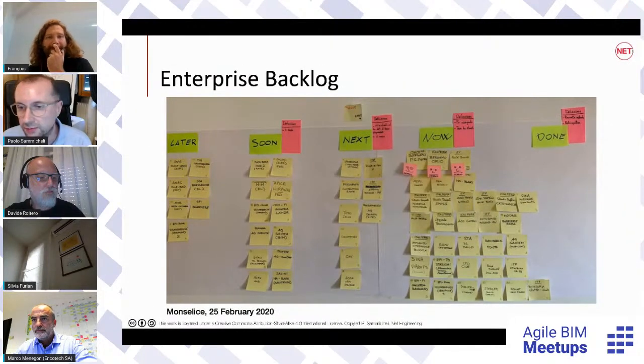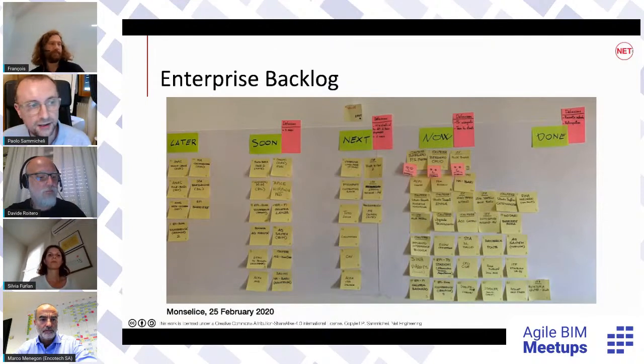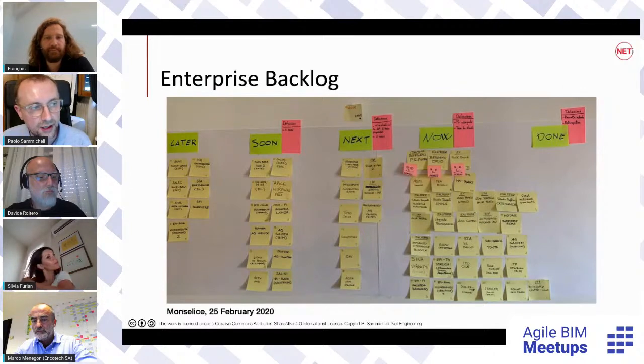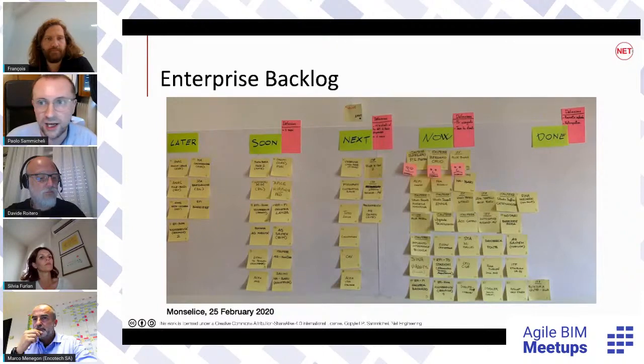The first available team member, or maybe a pair, if it's the case, takes care of the interruption, and they make it done as soon as possible, and they keep working on the next plannable item. And in case the number of interruptions overcomes the size of the buffer, well, in that case, the pattern says that we need to stop the sprint, replan, and notify the management and the stakeholders if some deadlines are delayed.